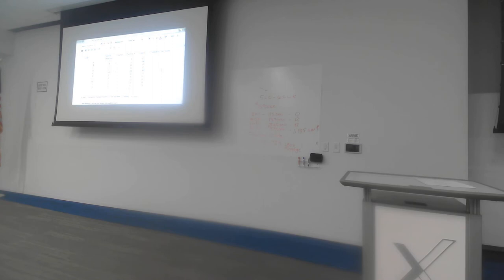So I want to apply that formula, or that logic, to each of those different activities all the way down. Activity A: the crash amount is 15, minus the normal amount of 5, gives me 10, divided by 1 is €10. In activity B, it's going to cost me €22 to do it in the normal duration of 8 days and €32 to crash it to 6 days. Then the expedite cost of that is 10 divided by 2, which is 5.